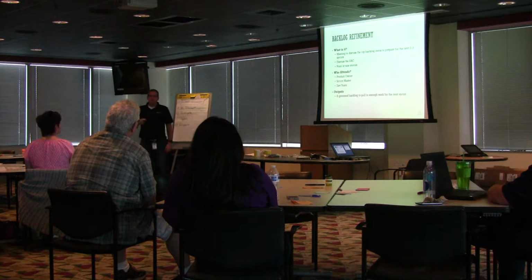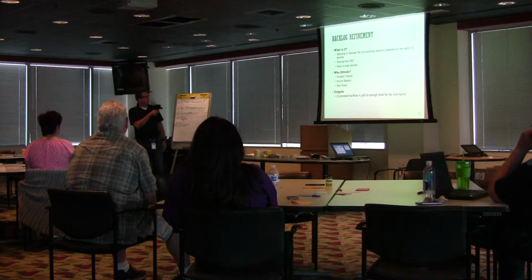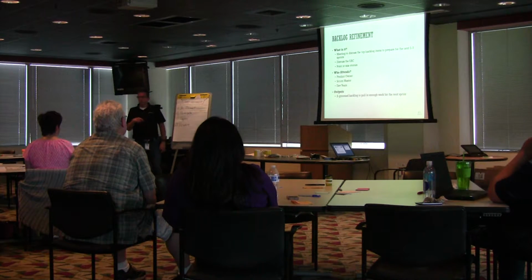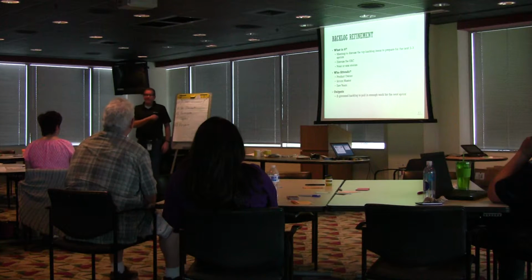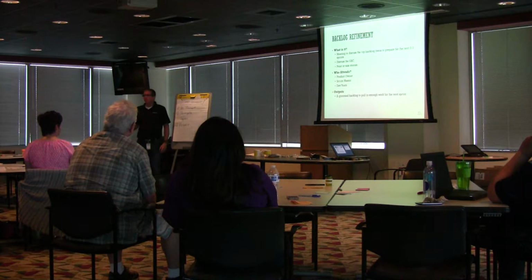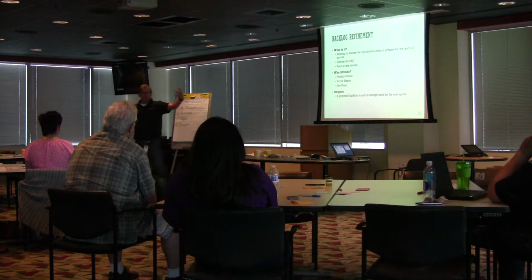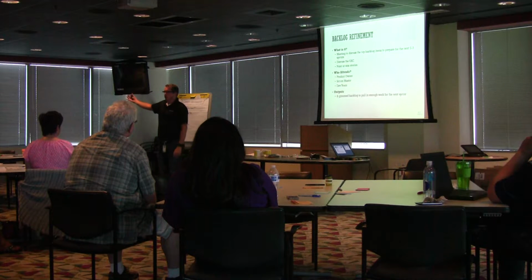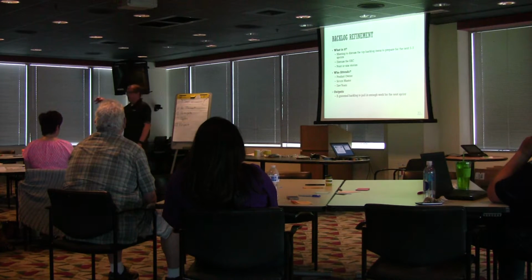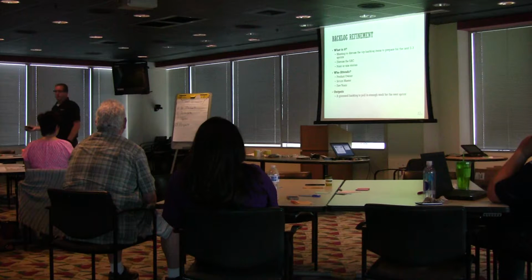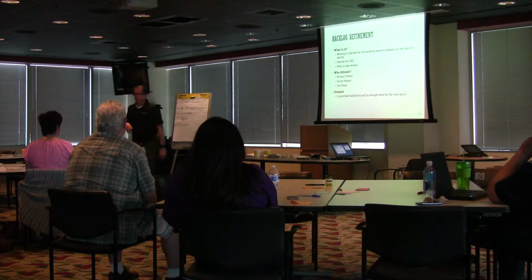The meeting gets us together at the same table to talk about what is prepared. If I were to go into planning tomorrow, this is the stuff that's ready to work. And do we have a collective understanding of what that stuff is? Ideally, we have 2 to 3 sprints ready for the team. Ready means I know what you're asking for. We've got some acceptance criteria. We've had some discussions around high-level design. I'm pretty sure I know how to approach it if you ask me to test this out tomorrow. That's the level that we're talking about.